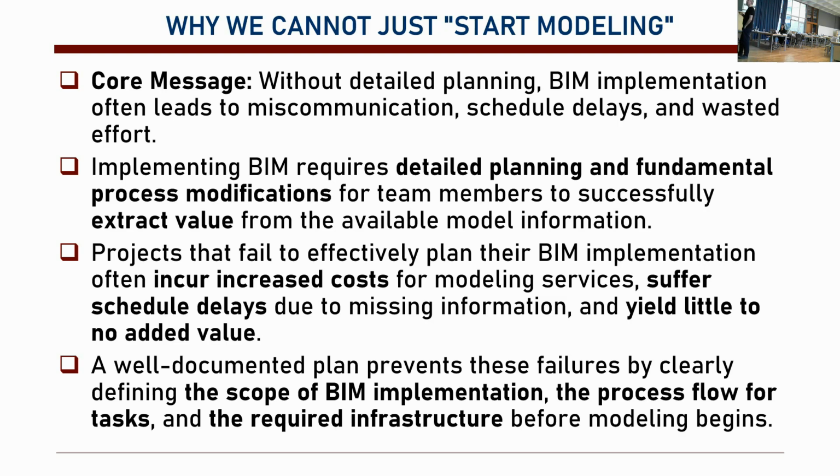So if we have a well-documented plan, the scope of BIM implementation is defined clearly, and that allows us to have a process flow. We will say, architect, you will design that, and then you will give it to structural engineers so that they can make sure that the beam depths are perfect.